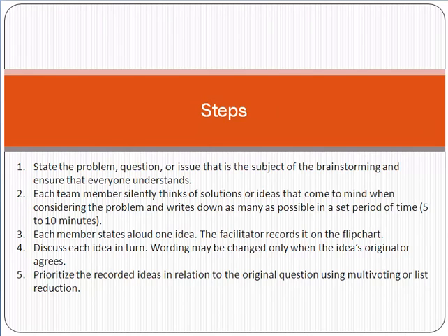And then after that, give some time to every person, at least 5 to 10 minutes, just to think about the brainstorming session, the objective of the brainstorming session. And then you can call one by one every person. Every person can come and give at least 10 to 15 minutes about his thoughts, his ideas, about the question, issue, and problem.